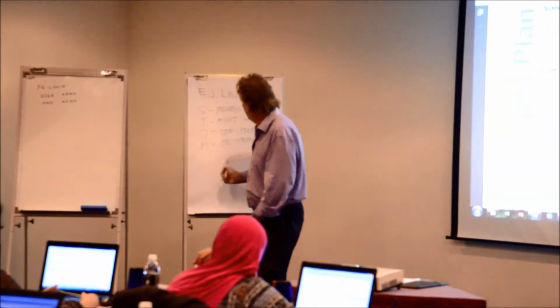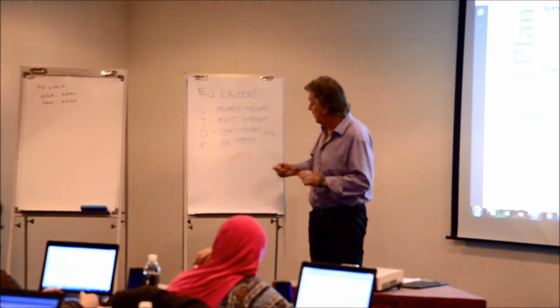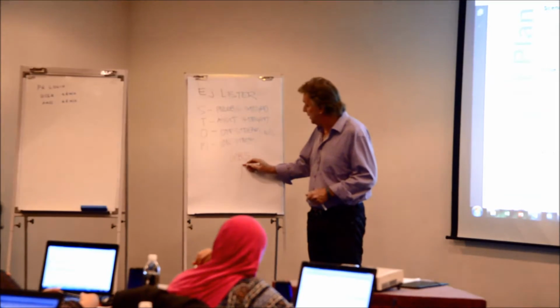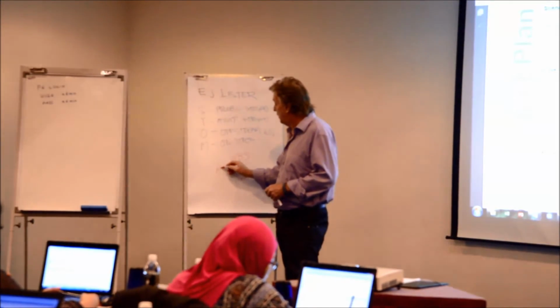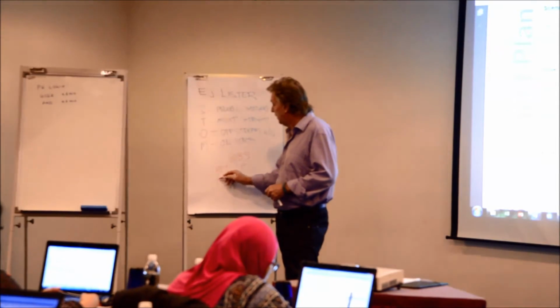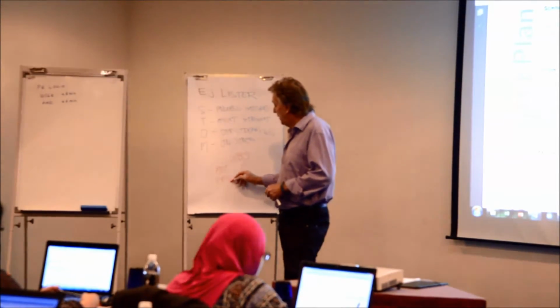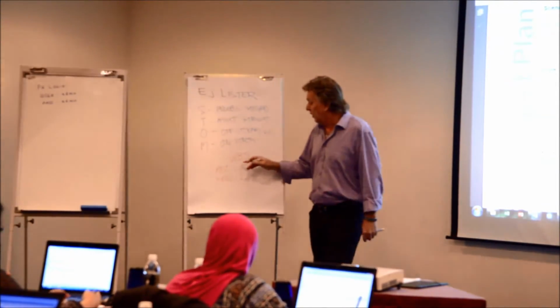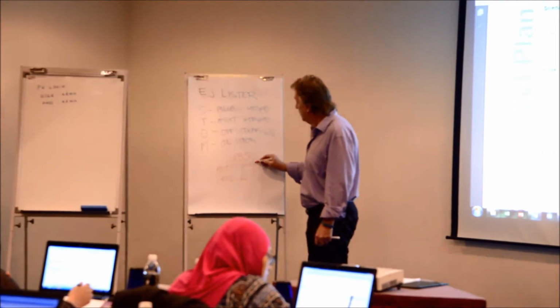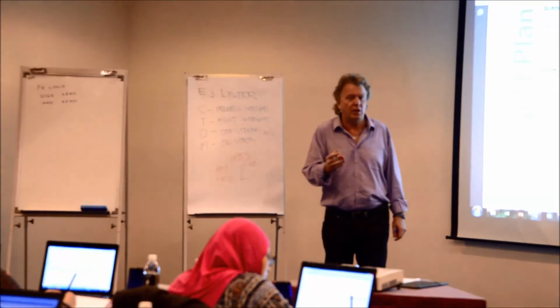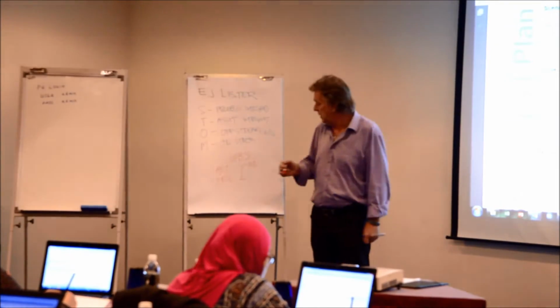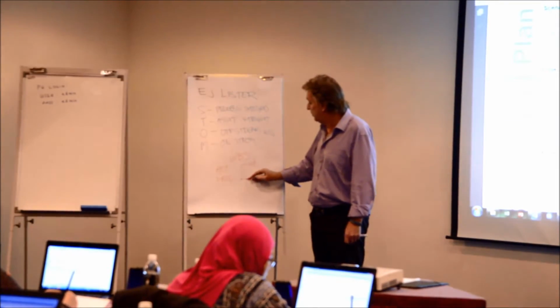All of that is done through a WBS using two key fields. I want you to remember this. These are key fields in my database. One of them is work order, because it's always unique. Okay? There's never a work order number duplicated. What do you think is the number 2?